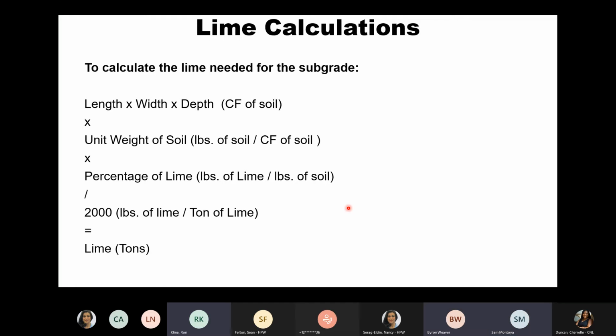We did the lime determination, didn't we, Oscar? Yeah, I've got the paperwork sitting right in front of me, and this is the lime determination with 48 pounds per square yard. That's on an 8-inch lift. Oscar, who did that? Did you do those calculations, or was it the lab? No, sir. Paradigm Laboratory did it. I have the paperwork sitting in front of me.